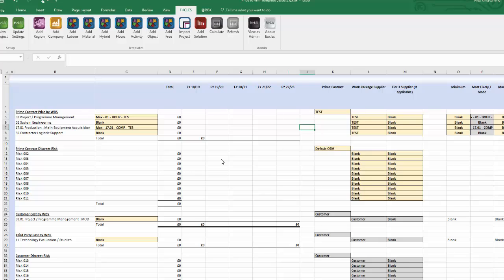And actually, the point here is that we can calibrate our assumptions because these subsidiaries don't tend to be that big. Generally, a lot of them might be only 30 million pounds. Put in your head sort of like $50 million there. So if we're working on a particularly large estimate, that might account for 60, 70, 80% of their future turnover. So what we've got is a bunch of indirect assumptions that we've made about how that company structure will look in future. So we can sanity check that against how it looks today.